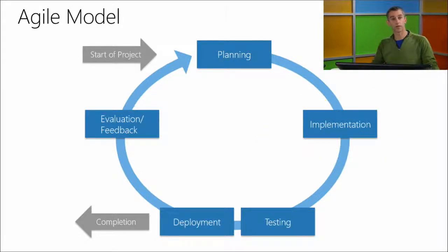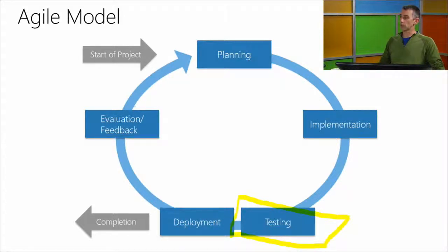You're going to have your feedback time, and that's the time to do the retrospective, to look back at that last process, see how things went, look back at the assumptions you made, and see what mistakes there may have been in the assumptions, and you can use all that information going into the planning phase next time.